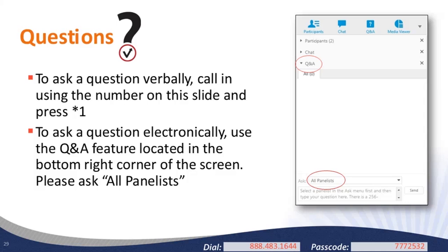So all of that goes to what Amy had mentioned earlier, that yes, the VAD should be considered a living document, and we understand that from the time that you wrote the application originally, maybe things have changed and maybe the VAD needs to be tweaked a little bit. As Amy mentioned, you can update the VAD in conjunction with your project director and your state office, but the goal of the project cannot change. That's the one thing that can't change. So yes, it can be flexible, it can change to the needs of the project, but you do want to work in conjunction with your state office to get that officially updated because they will need to approve that.